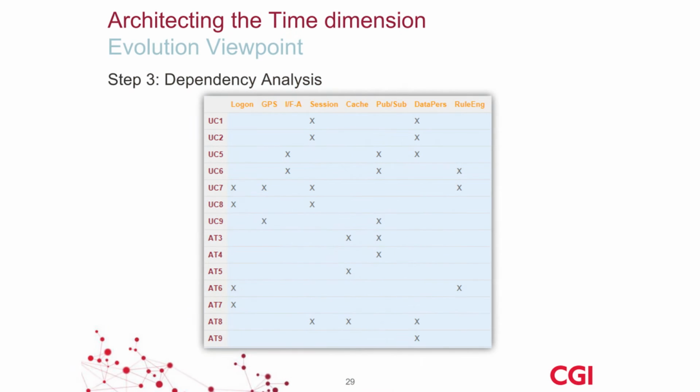So what is the next step here? Dependency analysis. This is necessary to be able to extend the runway in time. We have to know how all of the stories depend on each other. And here you can see a number of stories and how they depend on each other. I think we have all learned this in software school: how to make a dependency analysis matrix.